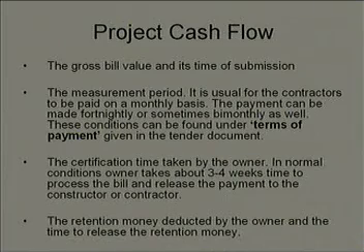In any construction contract, the contractor submits a cash flow statement, in which he indicates that in such and such month he is going to bill this much amount of money.